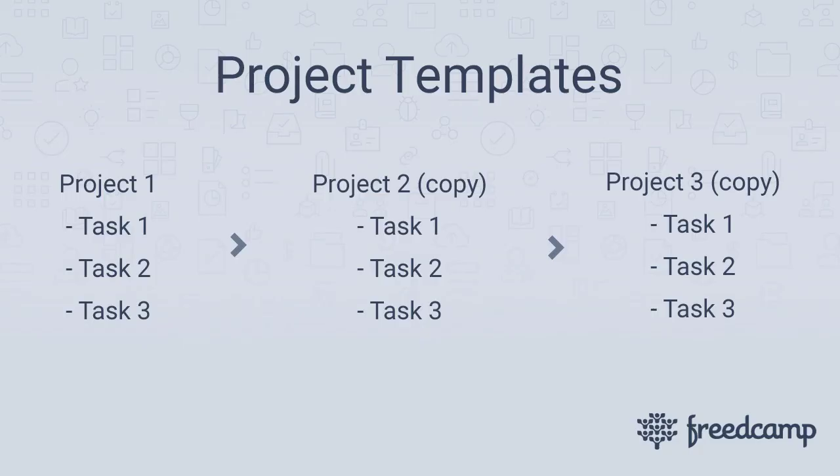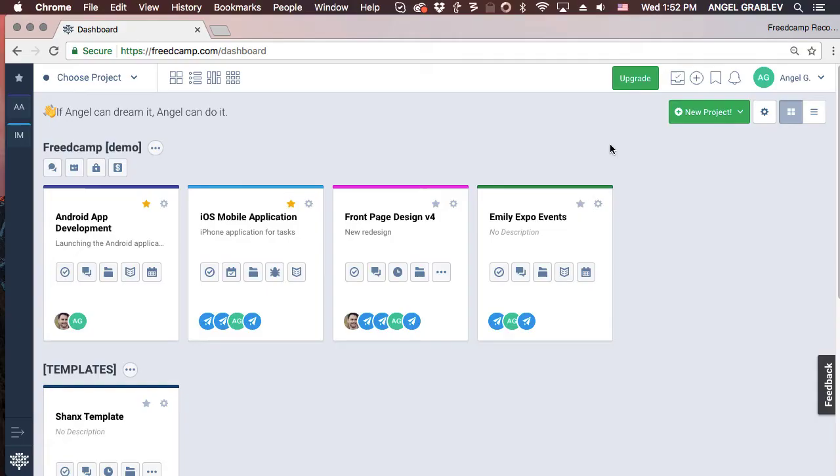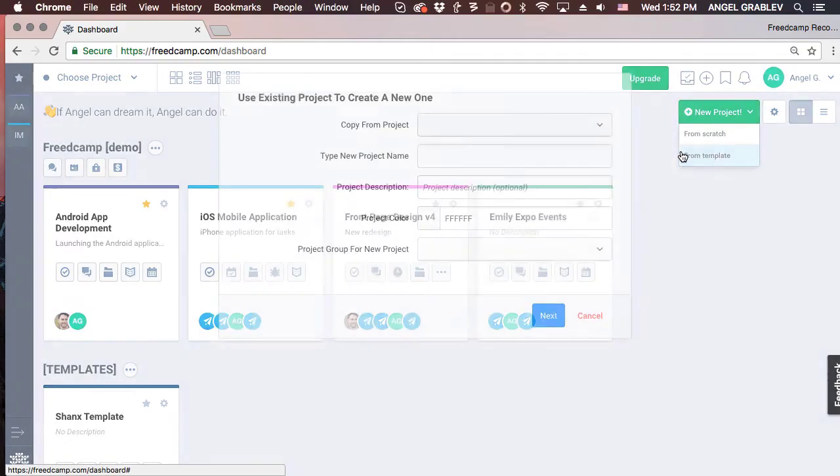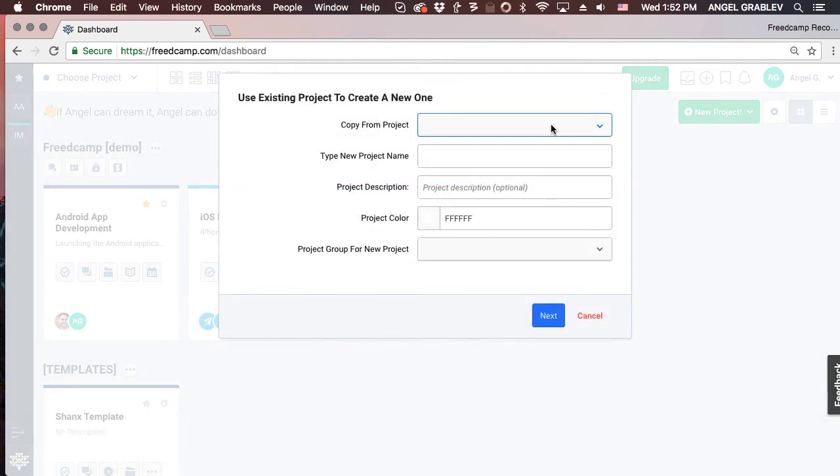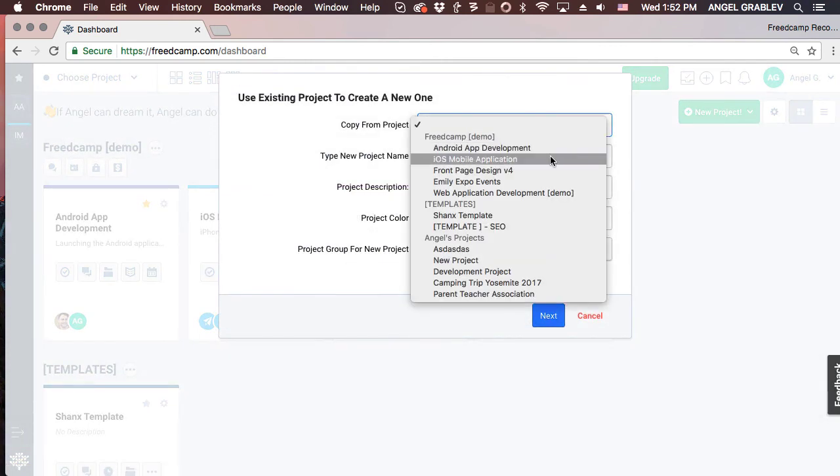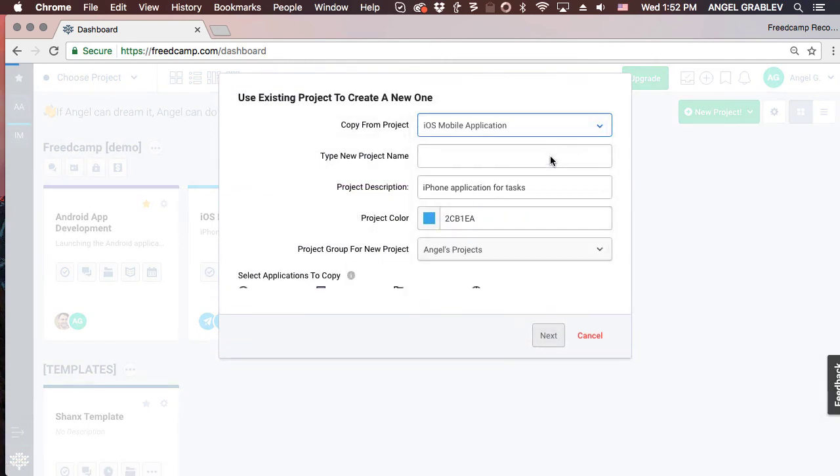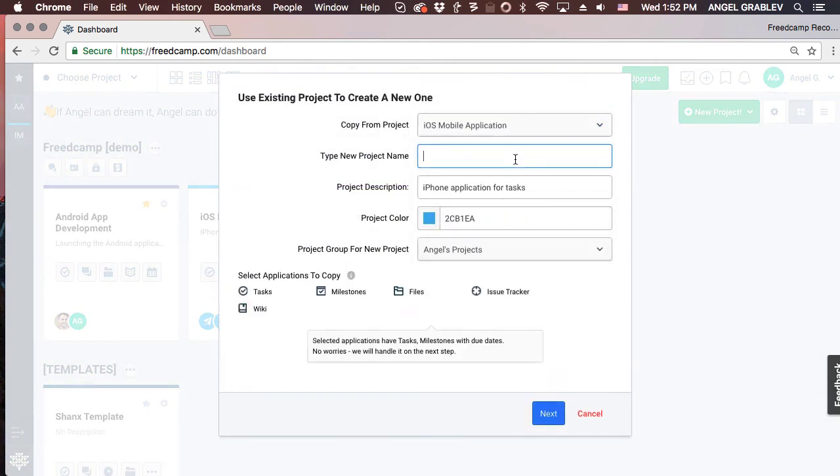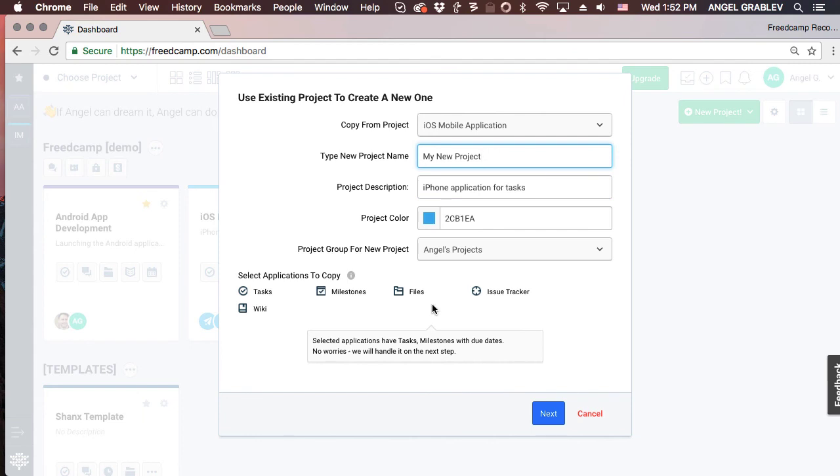With project templates, you can save hundreds of hours by copying projects that have common items. Select the New Project dropdown from your dashboard and choose From Template. Select the project you want to copy. We suggest making a special template project and archiving it so it doesn't appear in your project list when you use FreedCamp, but you can also just use existing projects. Fill out the rest of the information.